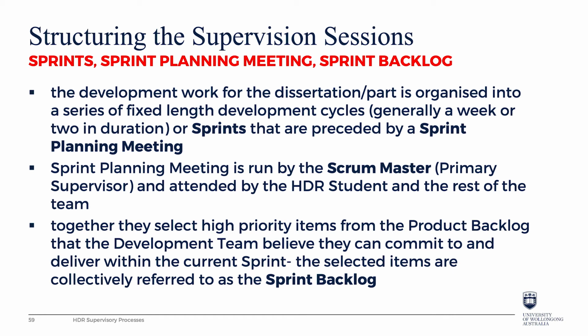And what's also being maintained is a backlog of things to do, the product backlog as it would be called in Scrum, but we could think of it as something else, the thesis backlog, if you like. Each of the sprints that are successively conducted is intended to produce bits of that dissertation, bits of that thesis. So the idea is that we're moving items from this sprint backlog. The student is then completing them, and then we get to reflect on how well that's done.